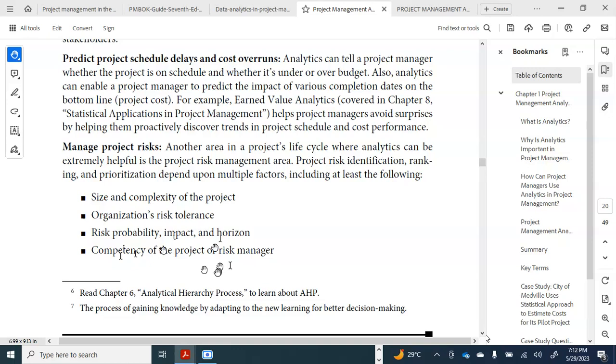29, 2023. And we've already ordered. Maybe the procurement is offshore. If it delays the end date and we intend to end this procurement activity as of, let's say, 2 weeks from now, just calculate 2 weeks from now. And if it exceeds that time, that means that procurement activity is a risky activity which can cause us harm if not properly followed.